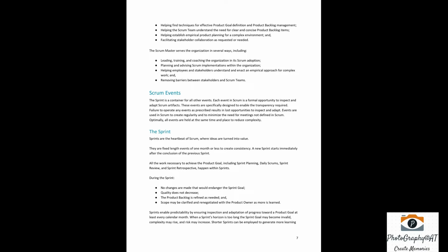The sprints are the heartbeat of Scrum, where ideas are turned into value. They are fixed-length events of 1 month or less to create consistency. A new sprint starts immediately after the conclusion of the previous sprint. All the work necessary to achieve the product goal, including sprint planning, daily scrums, sprint review, and sprint retrospective, happen within sprints.